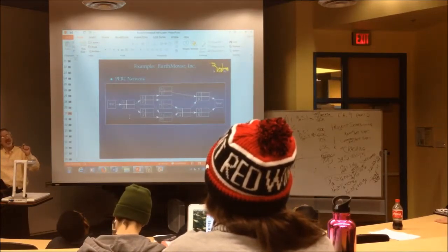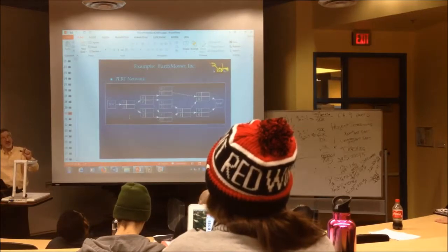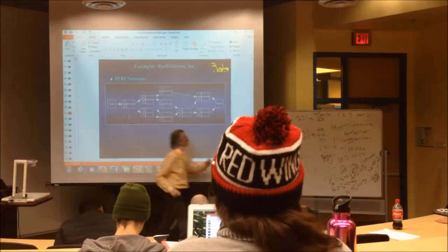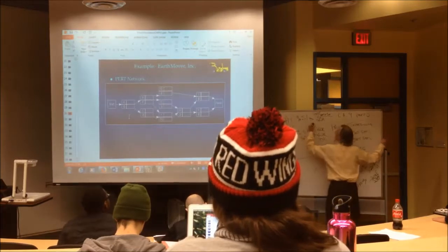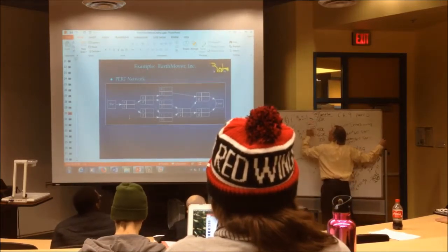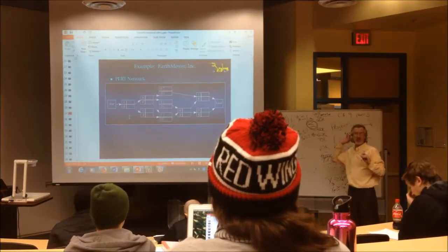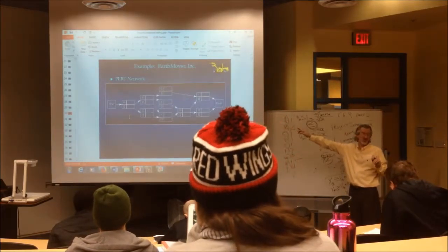You have to use the X variables for any activities that go to the end, that do not precede another activity. And make them, now I gotta write this down, I don't want you to forget this. This is the only one. These are less than or equal to however much time the project's being crashed to.